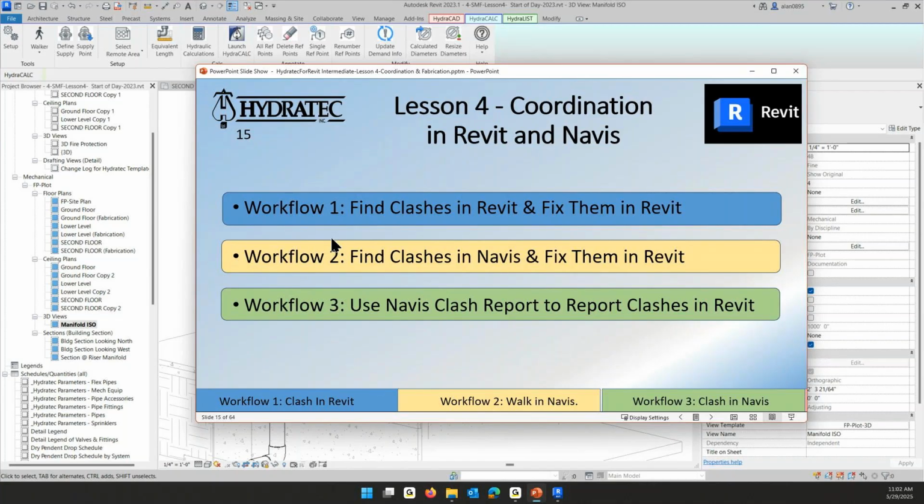The project manager says, send me all your stuff and I will run a report that tells me here's 500 places that something hits something else. And we'll sort through those 500 places one at a time and make them all go away. And I'm going to show you that process, and I'm going to show you a Hydratech improvement on that process so that we don't have to peek at each one of those 500 problems one at a time and go figure out where that is so that we can fix it in our model.